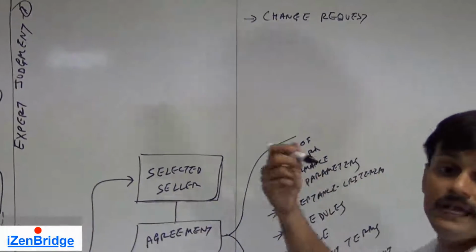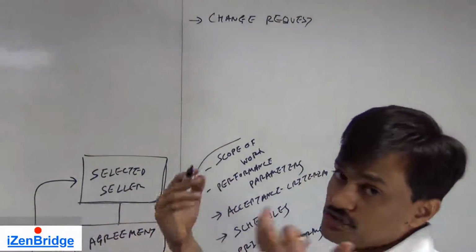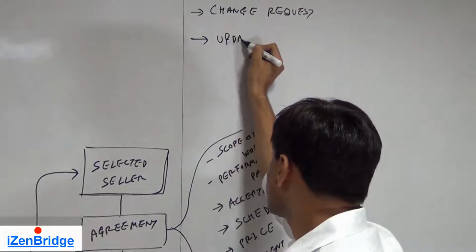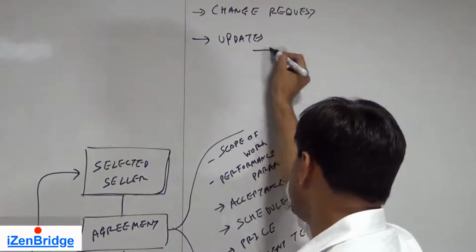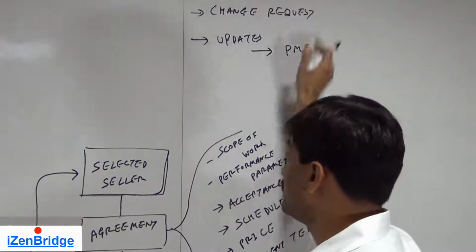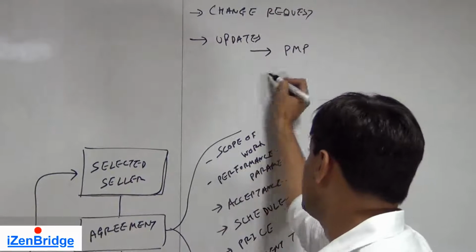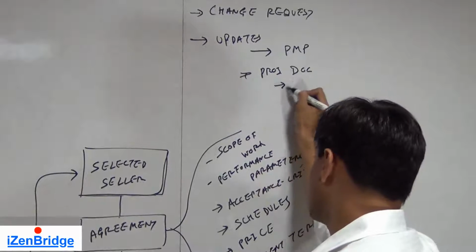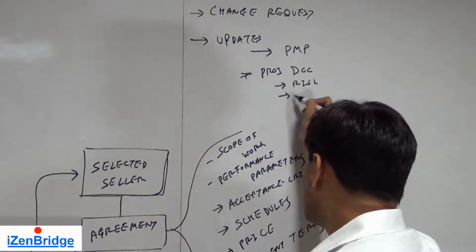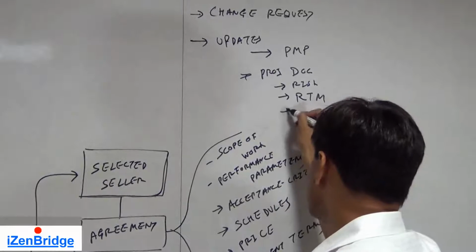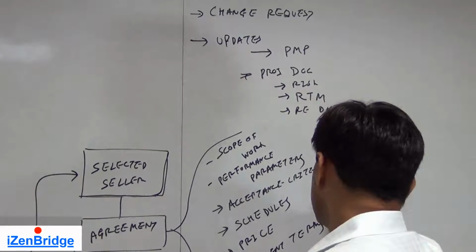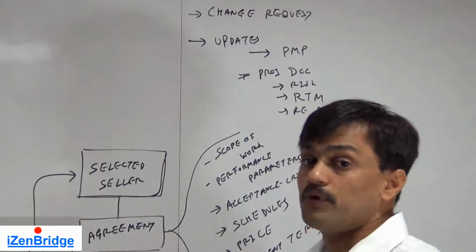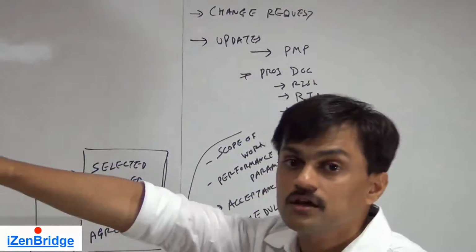We may need to update our project management plan and project documents. So things may get triggered to update the project management plan, which could be related to change requests and baselines, and project documents. Project documents like risk register and requirements traceability matrix, requirement documents may get updated, because the requirements traceability matrix should reflect which component is going to an outside vendor.